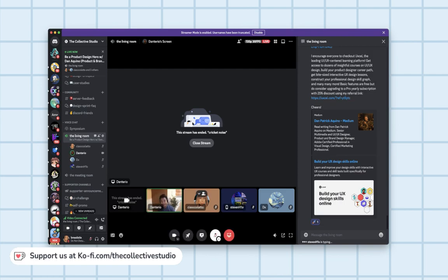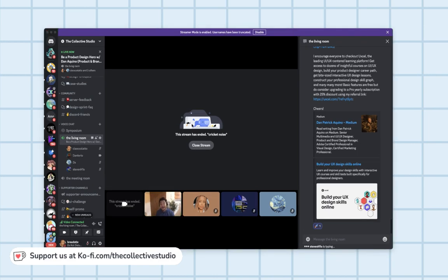And sometimes it's just really difficult to get their approval. They have a very busy schedule, so sometimes we would have to wait a week before we get that approval before we could go into the next stage. And then there are also other roadblocks, like for example, development constraints.